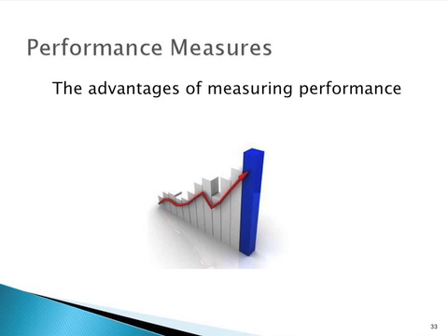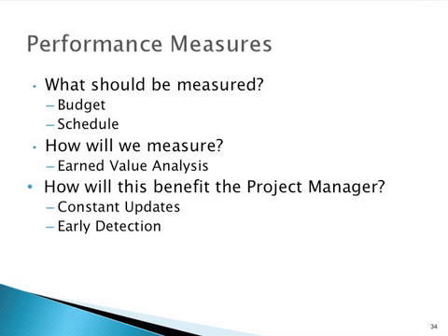Our goal will be to collect the appropriate data that will keep our project manager informed and give them up-to-date feedback and information to make timely decisions to keep the project moving in the right direction. We plan to do an earned value analysis of the individual tasks that make up the entire project. As part of the earned value analysis, we will calculate both the cost variance and schedule variance, which will give our project manager immediate information on how well we are staying within budget and on schedule.